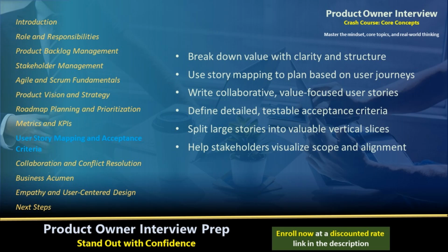Also, be ready to talk about splitting stories. Interviewers might ask how you handled a large story that couldn't fit in a sprint. Share techniques like splitting by workflow step, data variations, or CRUD operations, and always keeping slices user valuable.